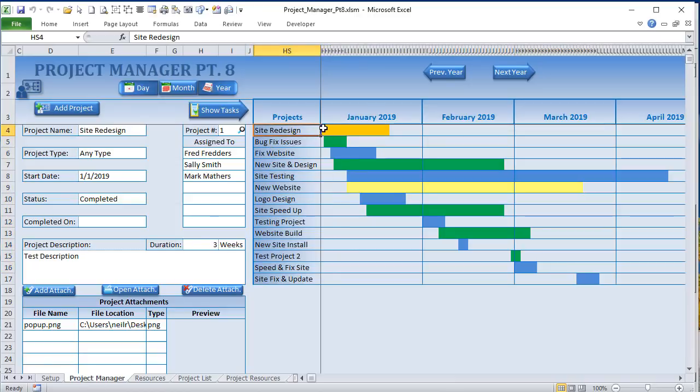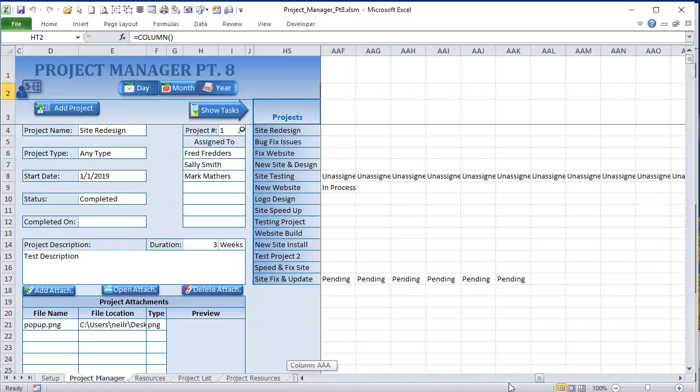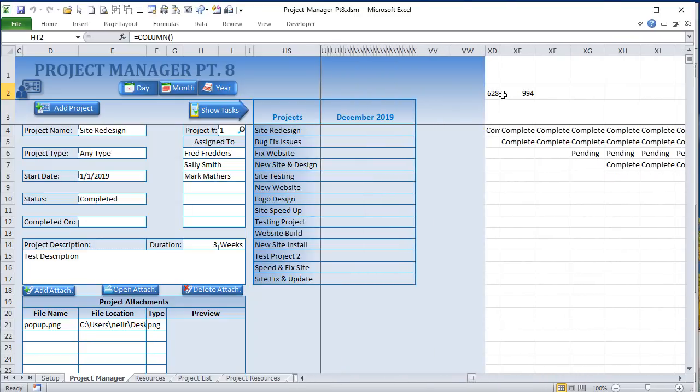And then what I want to do is take the project number and put that project number in the actual column for every single one. And then I want to move, actually we're starting in column 228 here. Remember 228. I want to go exactly, I believe, 400 columns over, right? We need 366 days for a year. So starting in column 628, which is 400 columns to the right, I